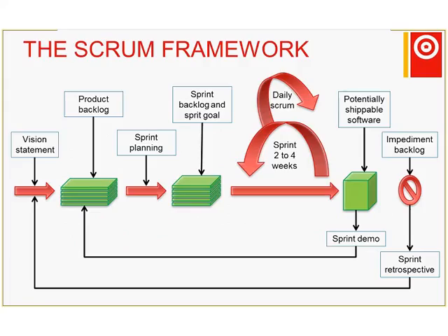So the Scrum framework, we have the product backlog, which initially is generated from the high-level requirements of our project. And then we plan a sprint. We plan to make part of that backlog into potentially deliverable software. The sprint is 2 to 4 weeks of work. Normally a project will choose a sprint duration.